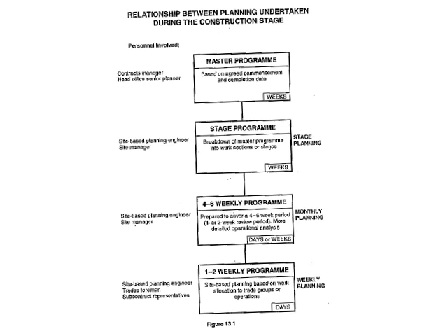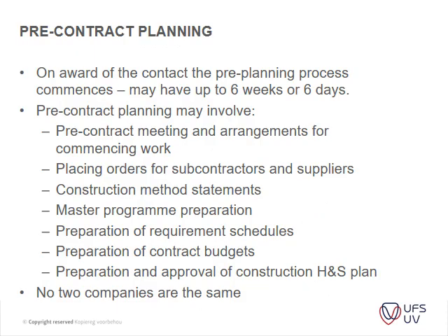Please just note that the people involved in this process are usually the contract manager, the master program, and the site-based planning engineers. It's basically a very straightforward thing of your master program being scrolled down into different levels, where you have your stage program, then your weekly program, and then your 1 to 2 weekly program. So your stage program is your master program divided further into stages, and then you've got your weekly program, which is divided into weeks, and then a weekly program is broken down even further to 1 to 2 weeks.